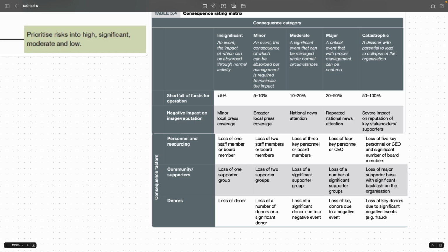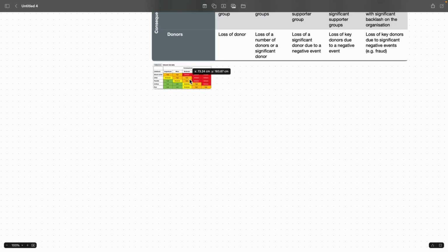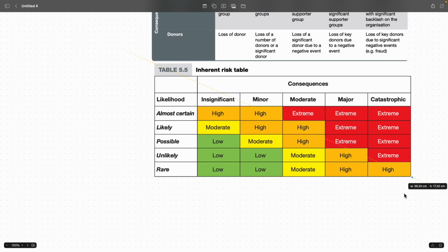The next one you have is the type of risk classification. The type of risk classification that you can get is this one. So you have inherent risk, remember? Insignificant, minor, moderate, major, that's the top one, like consequences. Then you have almost certain, likely, possible, unlikely, rare. So, plane crash for Air Asia. No, we already know the top. Now I'm talking about the likelihood.